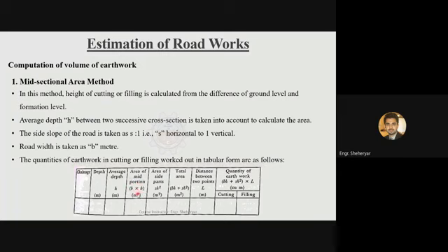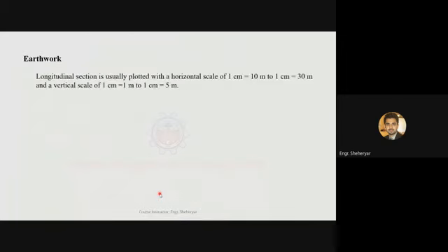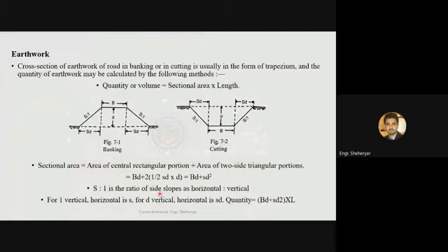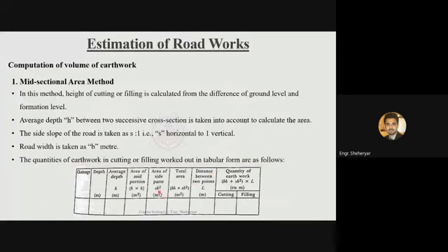So this is the area of the mid portion. Then area of the side parts will be equal to SH square. This is based upon the formula we have derived at the start, BD plus SD square. Here the D is replaced by H. So area of the side parts is SH square, and the total area will be BH plus SH square.